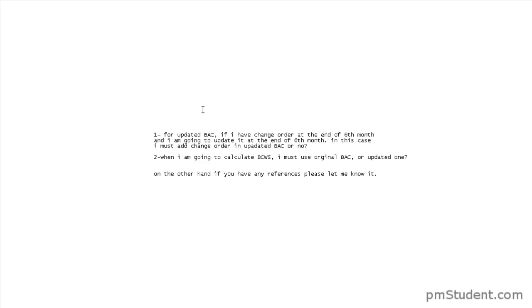Really, in a good change control system, any change that comes through is going to have the impacts on scope, schedule, all of that attached to it. So if a change is approved, it means that you're also approving the changes in the budget. As a part of that change request getting approved, there needs to be some provision for allocating extra budget, or whatever the impact is. You need to make sure that you're able to actually do that when you do the approval.